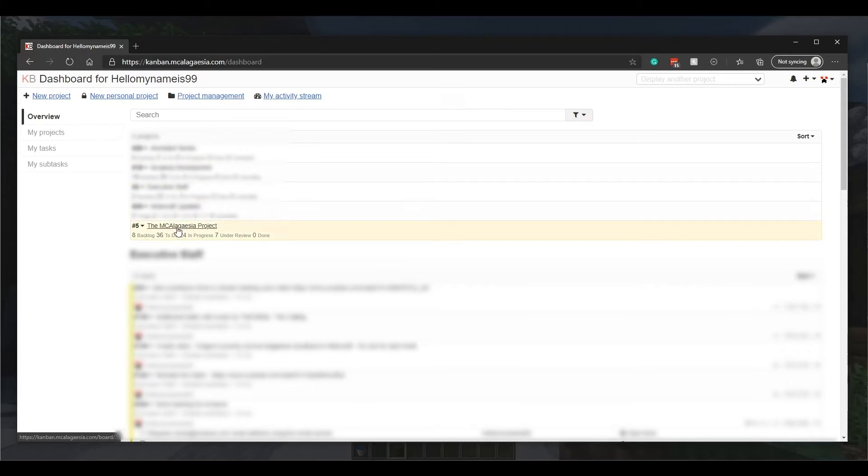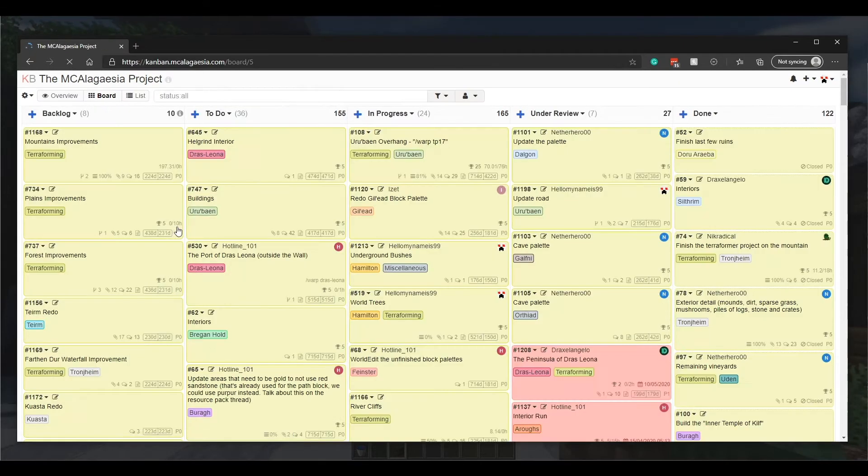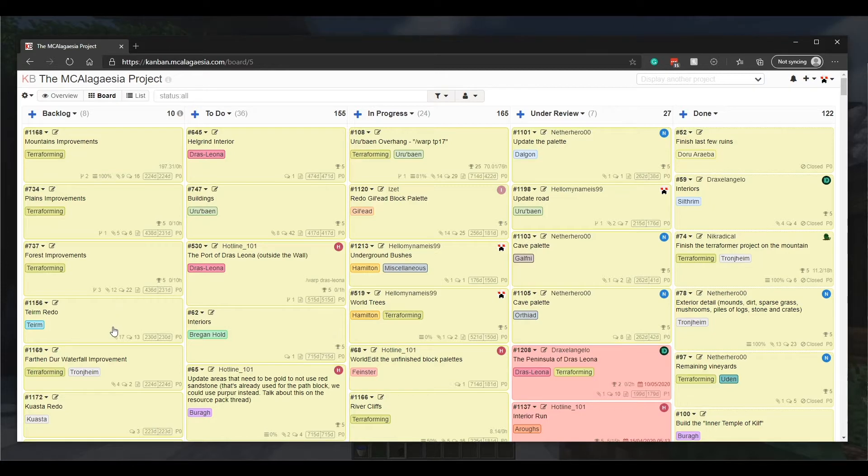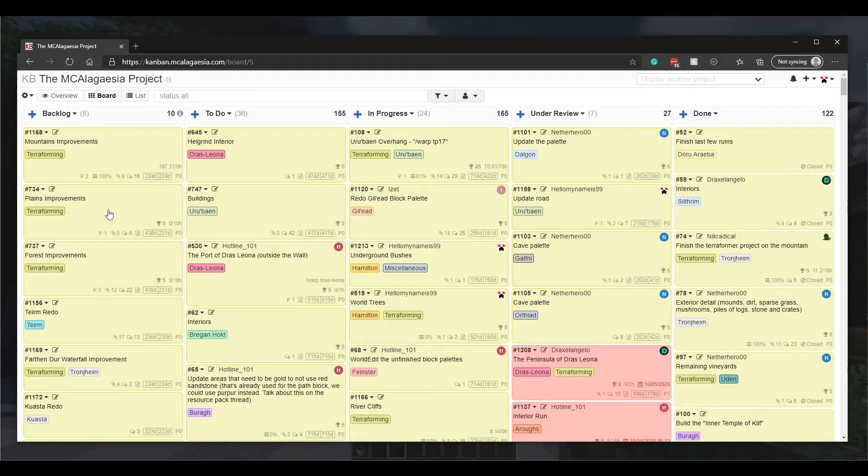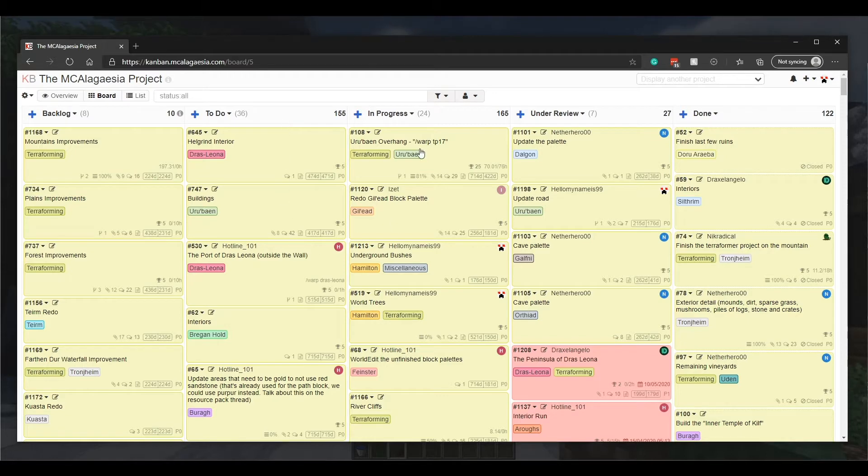So we'll click on this project and we're greeted with five columns. The first column is the backlog, and this is a list of all tasks that we have on the back burner. For most of these, we'll only start working on them after we've completed most of the other things that are already to-do or in progress.